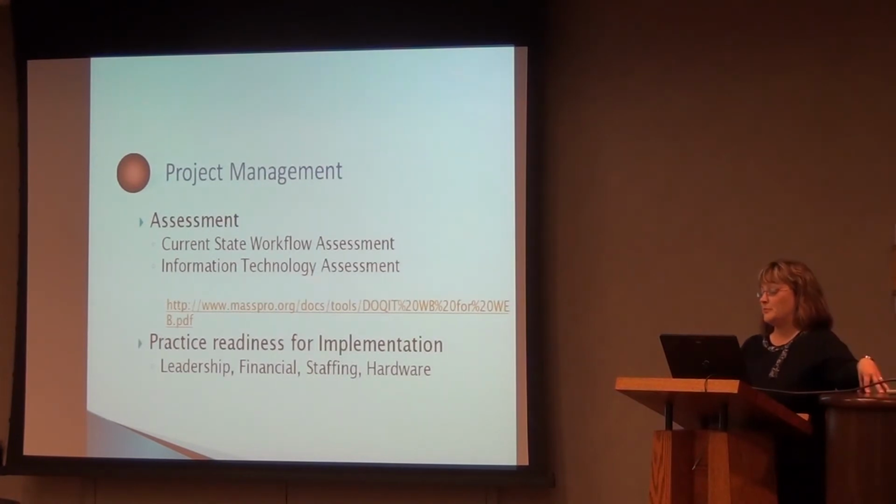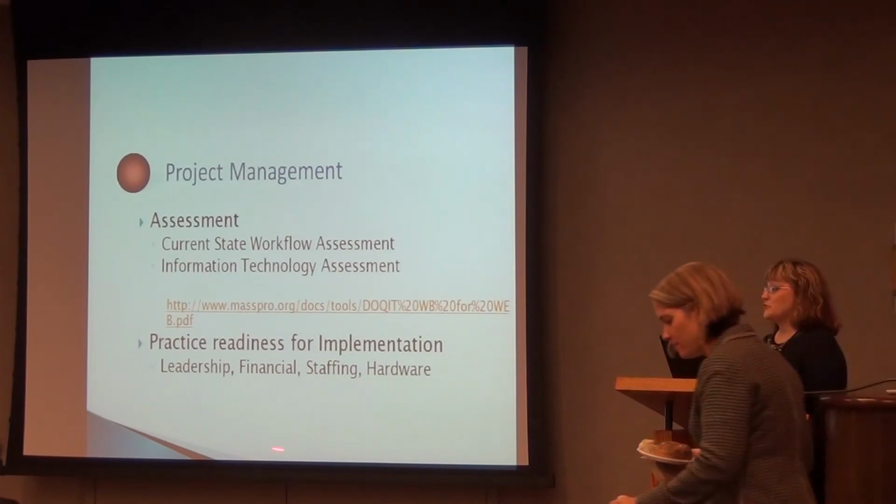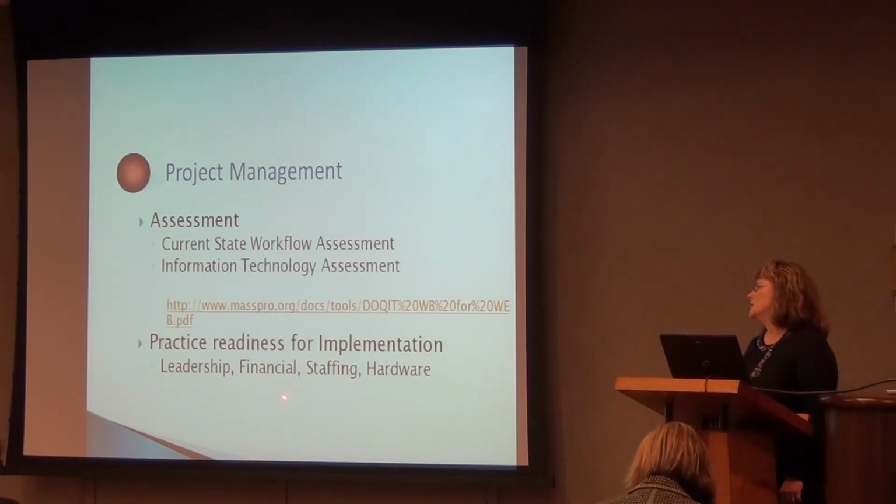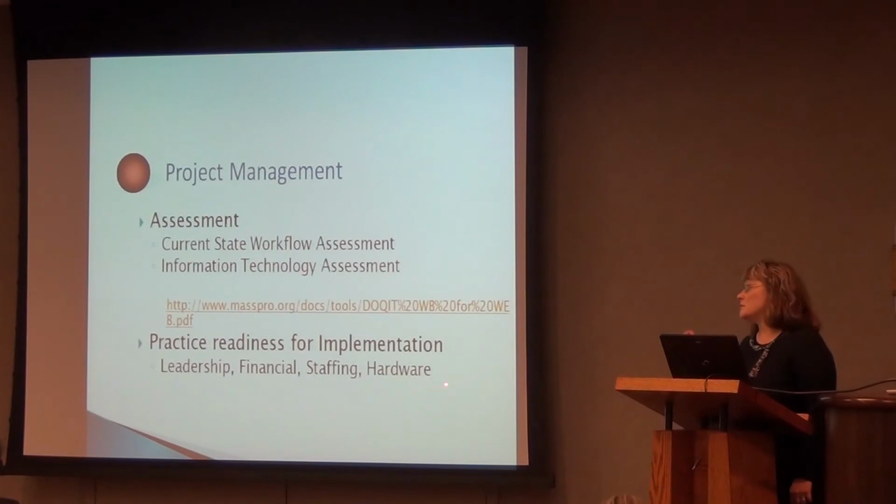I had a practice that had a triage nurse, and that was perfectly fine: she sat at the desk all day, did triage with the practice's patients, and a desktop was fine for her because she was on the phone. We also do a readiness for implementation assessment. We have some practices that actually are not ready for EHR implementation or need some tweaking. This includes making sure you're financially viable when you're going through this, making sure your staff is prepared for this, making sure you have the right hardware and the leadership's ready to do this project.